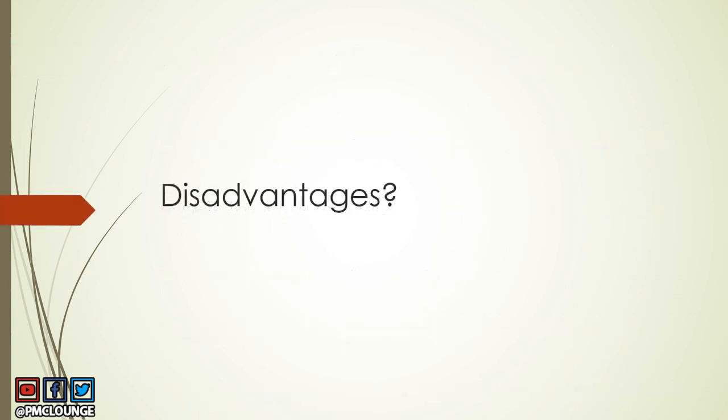Are there any disadvantages that you can think of? Well, here's one that I'd give you, and definitely if you have any other disadvantages that you can see in this technique, do drop them in the comments. But here's one I'll give you to walk away with, and that's the fact that you need historical data. You need a database, and you need historical data to be preserved so that this technique can be used for future projects. If you don't have historical data, if this is your organization's first project, then you cannot do analogous estimation.